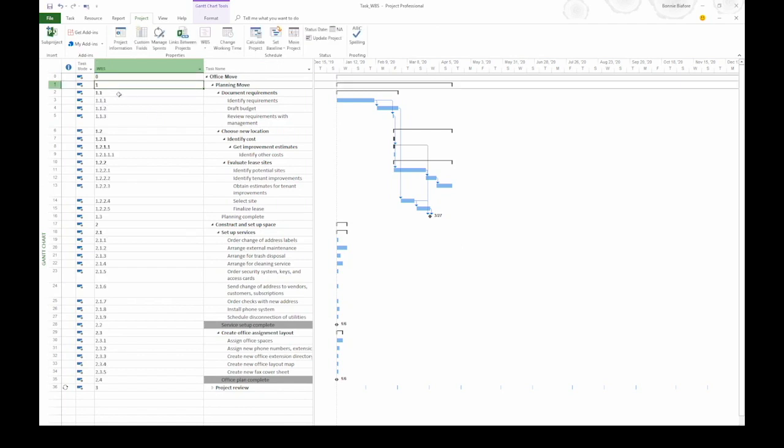Out of the box, project creates a WBS using numbers at every level. If we look at this, we can see that the planning move summary task is at level 1 and it has just the number 1. The first summary task underneath it is 1.1, and then the work tasks beneath that summary task are 1.1.1, 1.1.2, and so on.